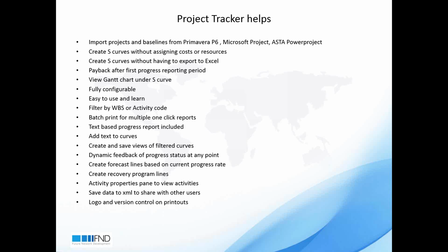But these are majorly resource S-curves and cost S-curves. And for people not using a resource-loaded, cost-loaded schedule, the S-curve inside of Primavera and inside of Microsoft will not give the real expectation, because you need to make a very good schedule inside of Primavera and Microsoft Project to be able to get a correct and healthy S-curve.